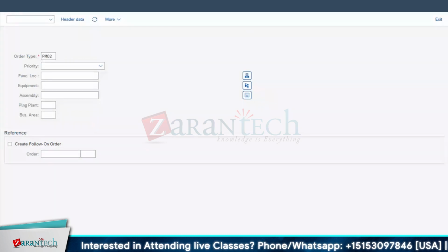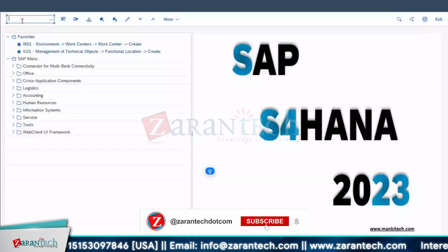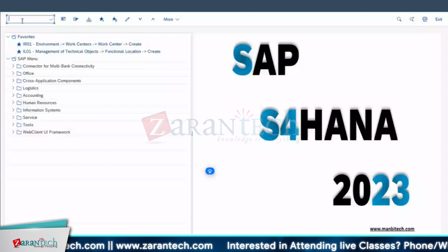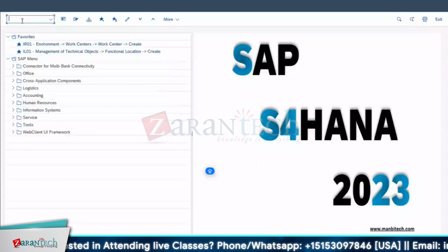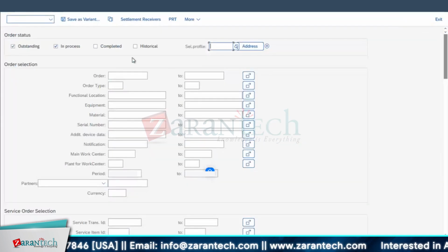Say, before the start of the revision, a manager gives an instruction that everyone has to create an order today, and I should know the estimated cost for that, or you can plan it beforehand. Then how will I have a report? The report is IW39, the work order list. You will have a work order list with outstanding, in process, or completed orders, all those things.